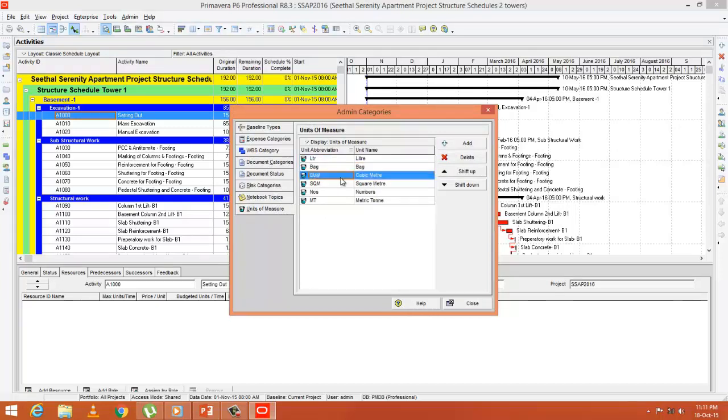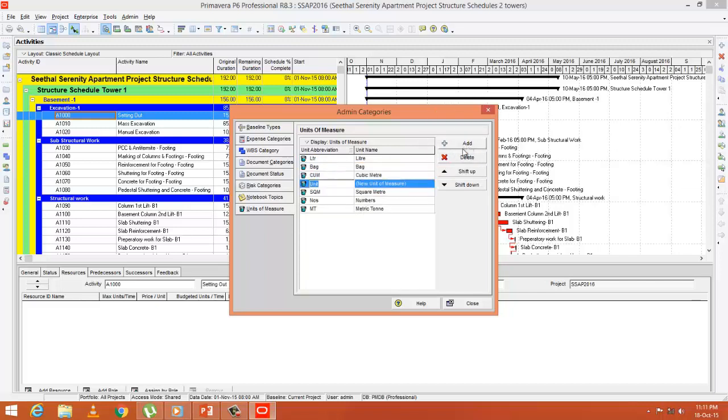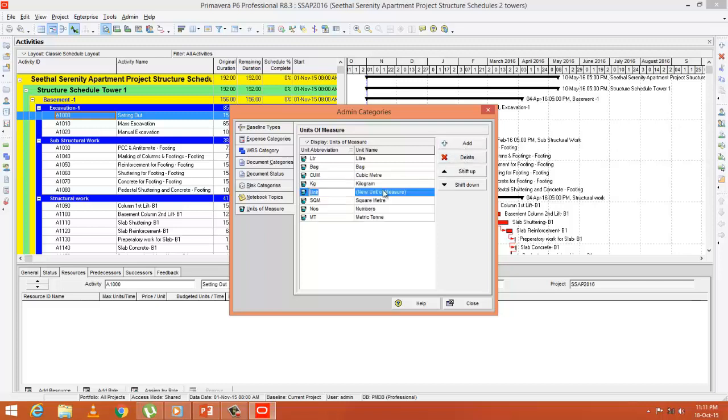Let's say if you want to add a new measurement called kilogram, you can press Add, then unit abbreviation KG and unit name Kilogram. For running meters, it's RM and unit name Running Meter. This is an example. Similarly, you can add all the units of measurement in your project. After that, you can close it.